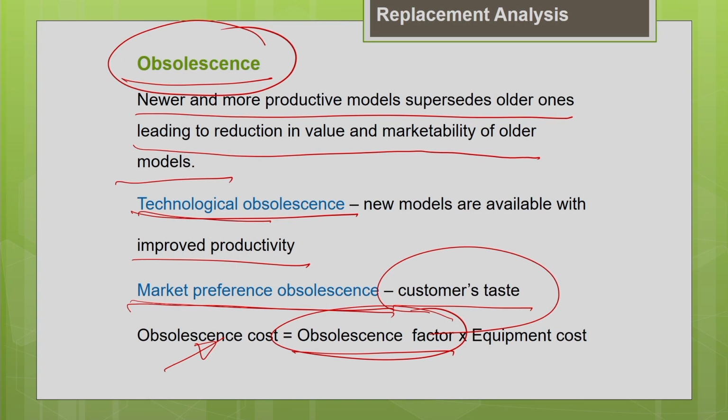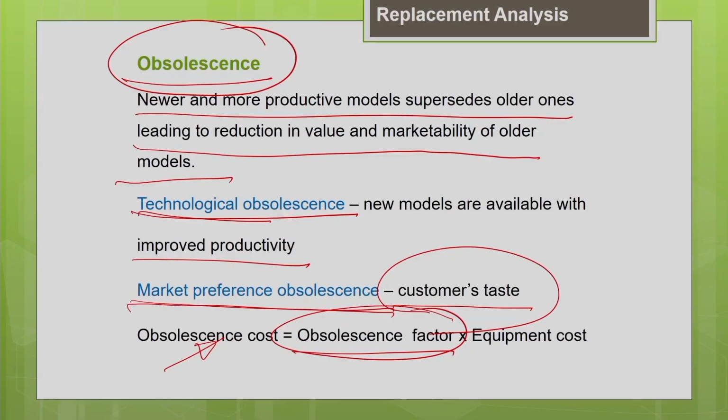This will give a better understanding of how to estimate the economic life of the machine. Hope you remember what the economic life of the machine is. Economic life is nothing but the time period during which the cost associated with the machine is minimum. If you are going to optimize your production with respect to cost, then we have to go for the minimum cost. If you are optimizing with respect to profit, then you go for the period with maximum profit. Economic life is the time during which the cost of holding the machine will be minimum.